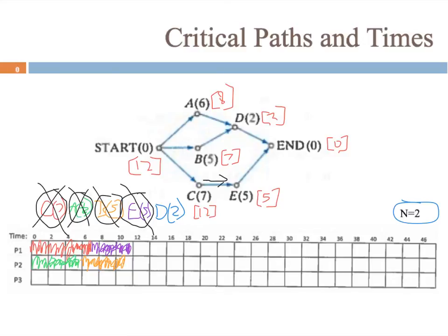Let's look down at worker 2. At hour 11, task B becomes complete. Once A and B are complete, notice on the digraph, just kind of a review here, A and B are both incident to D. They both need to be complete before we can work on D. So now that they are, task D is ready. So now at hour 11 we can give task D to worker 2. And yeah, starting there at hour 11. So in only 2 hours, so 11 all the way up here to 13.